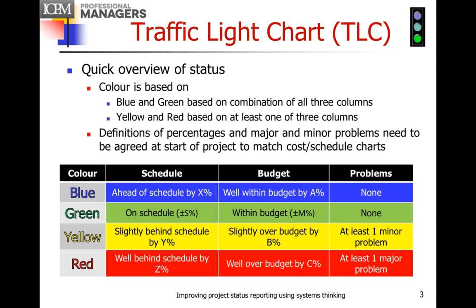The way you set the colors: for a project to be blue or green, all three conditions have to exist. But for a project to be yellow or red, only one of them has to be present. The definitions of percentages and what constitutes a major or minor problem need to be agreed to at the start of the project, and that information has to match what's in your regular cost and schedule charts.